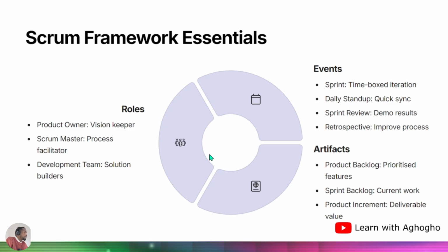If the stakeholders are not happy with the product that you've presented to them, they bring up one or two requirements that need to be included. As long as they are within the scope, the team goes back to the drawing board, takes that in as a requirement, puts it back in their sprint and comes up with such execution in their subsequent sprints.